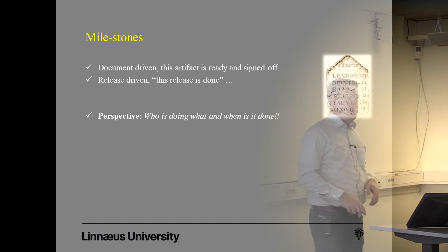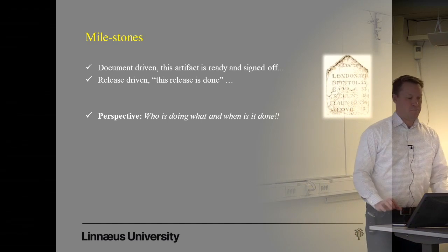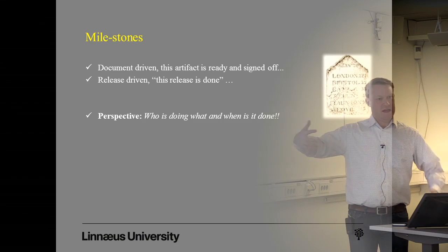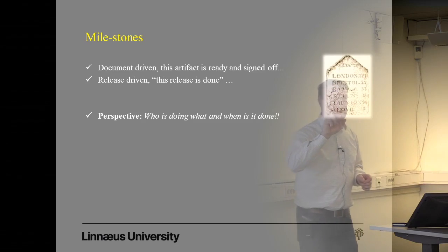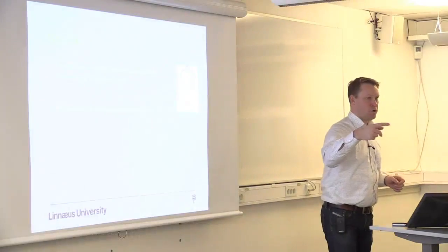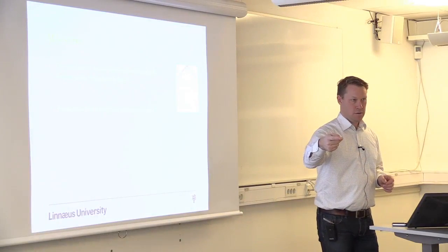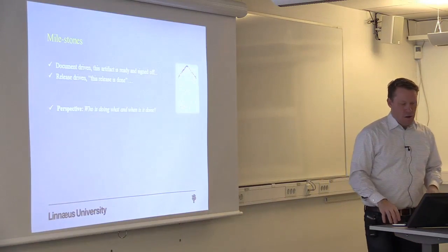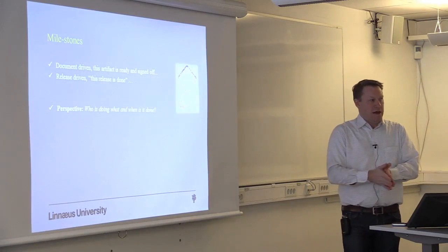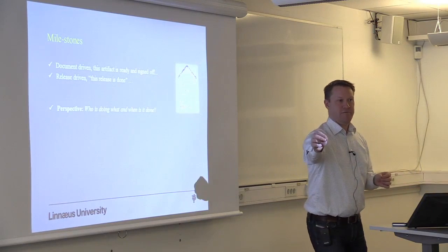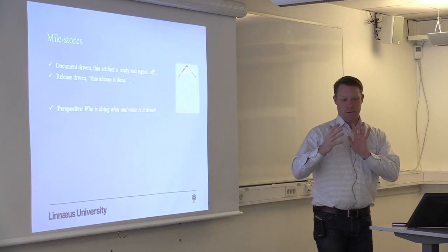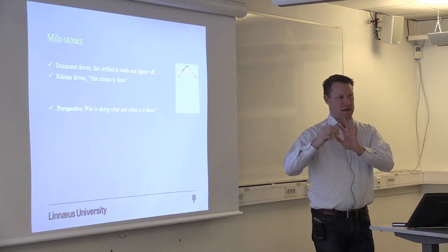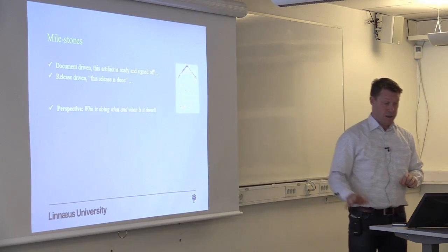In the software development process, a milestone approach is often document-driven. It has the perspective of a manager who's interested in controlling progress in a project. So the goal here is like, two weeks from now, this artifact should be ready and signed off. Ready, inspected, approved, signed off. Okay.